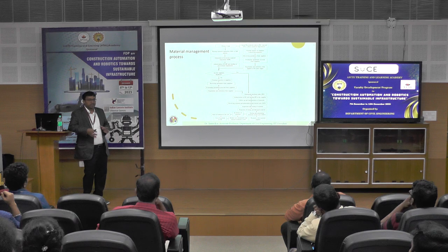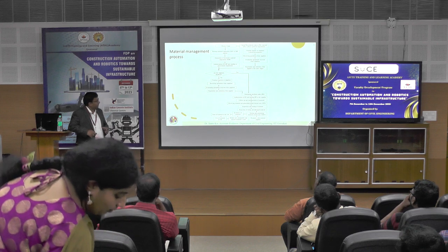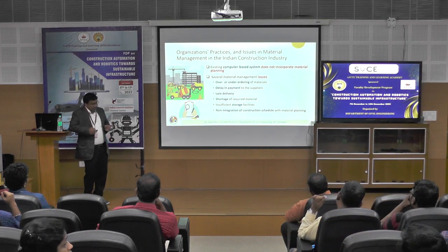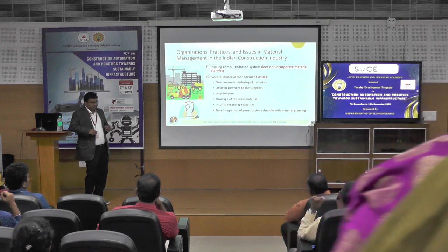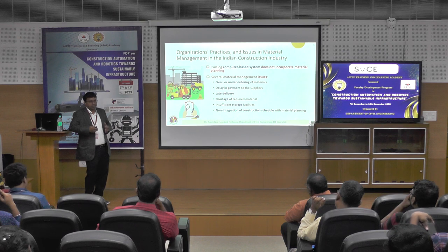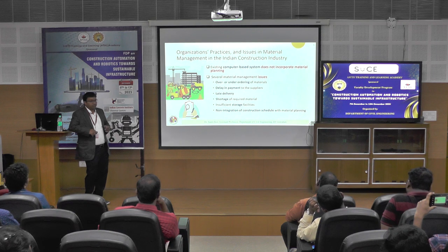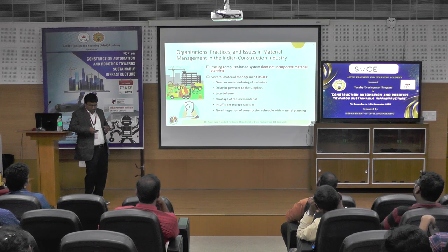The existing computer-based system does not incorporate material planning. Companies like L&T and SPCL use ERP SAP models, but these do not incorporate the material planning module. Several issues were identified, including over or under ordering of materials. Ordering too much increases inventory cost, requires more storage space, and some materials stored for long periods get damaged. Under-ordering stops activities midway.